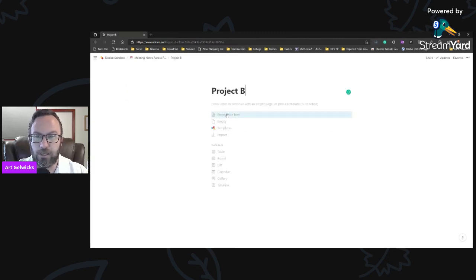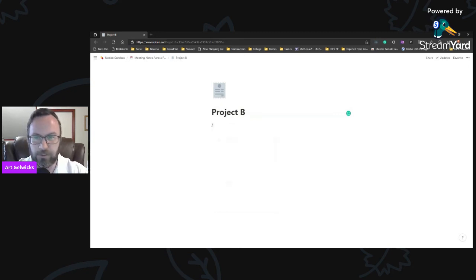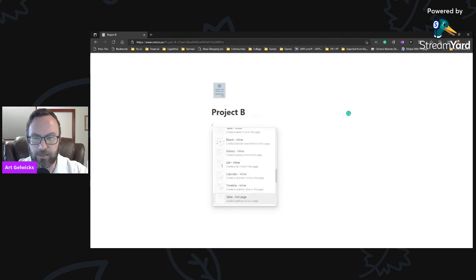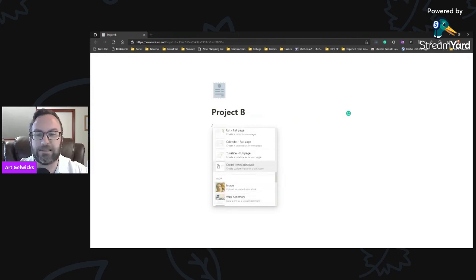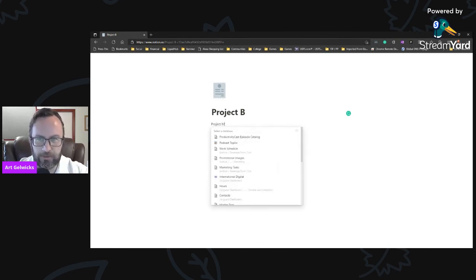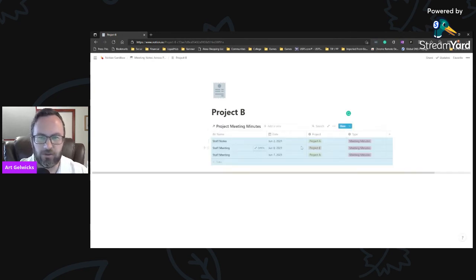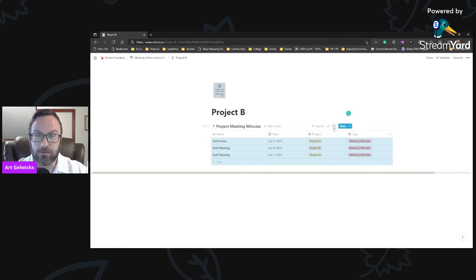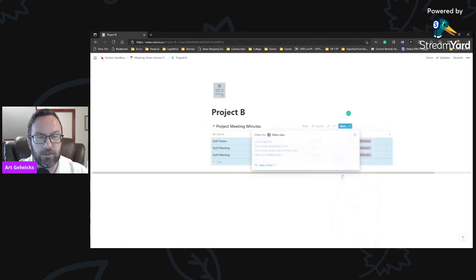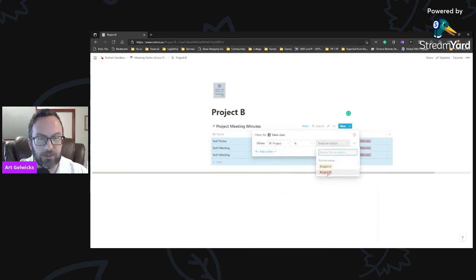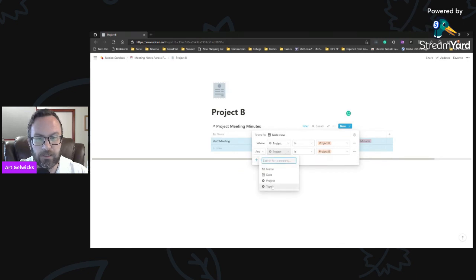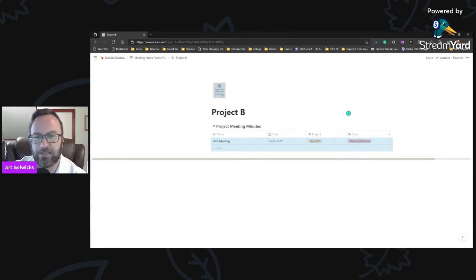But we can do the same process just as quickly now for project B. I go into project B, I tell it to be empty with an icon, we'll add an icon for it for no reason. We're going to pull up our options here and go all the way down through to where it says embed. Or I'm sorry, I always get this wrong. It's a create linked database. And we're going to select the project meeting minutes, smart enough to pre-populate that for me. Sure enough, there's my listing. Now you'll notice the filter did not come along for the ride, so I do need to recreate that again. So I'm going to go in and create a filter again here, two steps, add a filter. In this case the first part is project is going to be project B, and the second part is going to be type is meeting minutes. Sure enough, done and done.